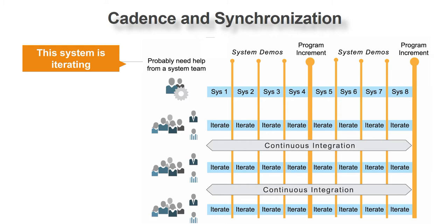They're setting up a cadence there. So cadence is nothing but having a fixed frequency period of time. So if you're working in a sprint, it is going to be 2 weeks. Every team is going to be working in a 2 week frequency or a 2 week sprint, and thus you're setting up that cadence. So how it happens, what it helps with, at any moment of time you have to do an integration, you can do it in a very simple manner, and hence synchronization becomes easier.